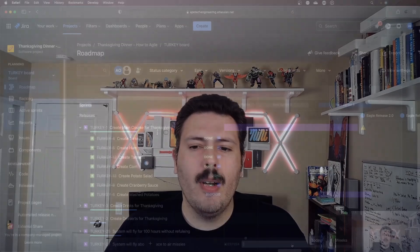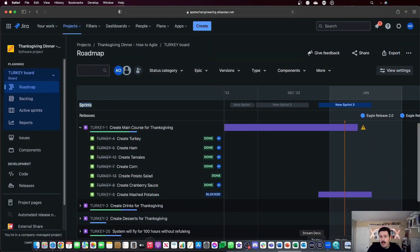I'm going to scroll over to the left a little bit, and you're going to see that the dates that you define for your sprints, they actually get nested and embedded into your roadmap. So from that perspective, it's good. It's a good thing that your stories can't have those dates because it would just clutter the things. It would clutter the narrative of the story belongs to the sprint and the sprint is defined by these dates.